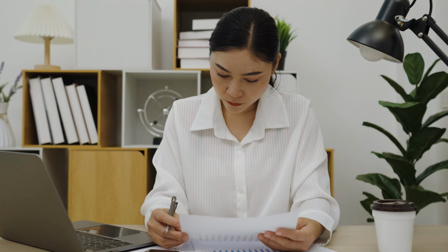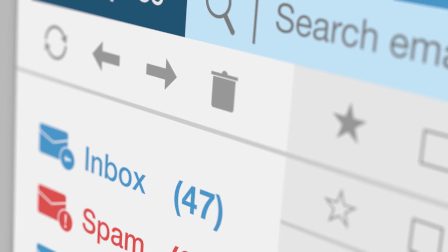So number one strategy is to, first of all, centralize the invoice capture process so you don't have to rely on project managers to receive the invoices. It should come to a single inbox. So even if you're manually processing the invoices, you at least have one place to look at versus multiple places, which increase the risk of duplicate payments.